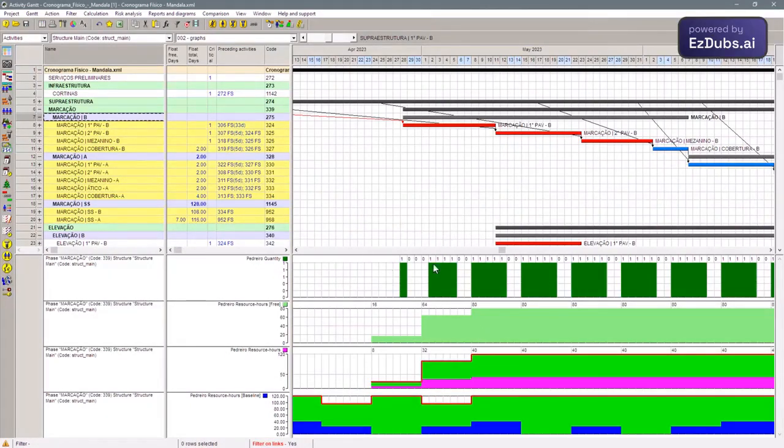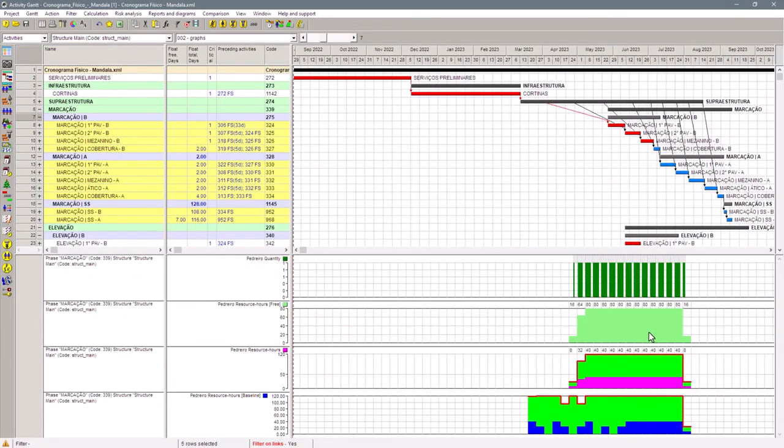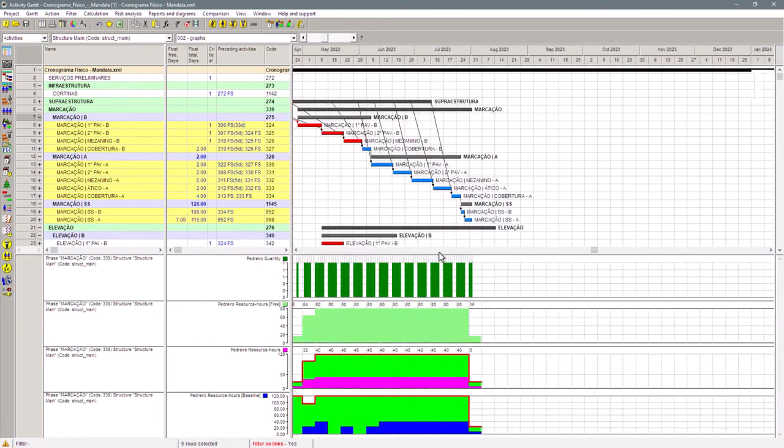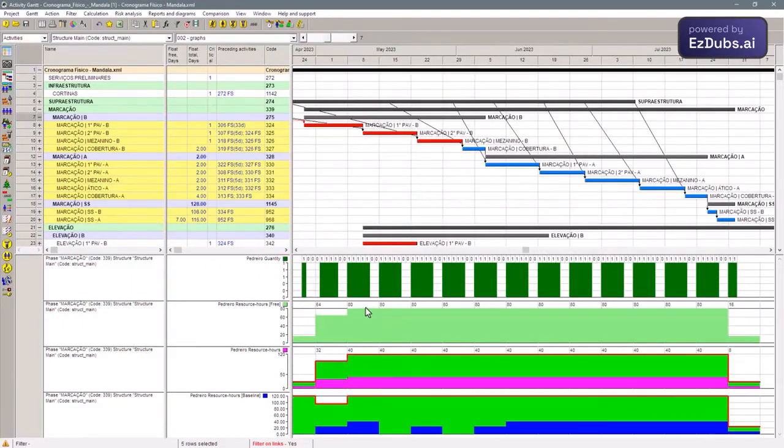Due to the number of bricklayers with all these conditions, in green, of course, free hours, which I represented here below in darker green. And here in lilac, the number of bricklayers, hours of bricklayers who are actually working, increasing. Here we have 80 hours free per week. And here we have 40 hours worked per week.